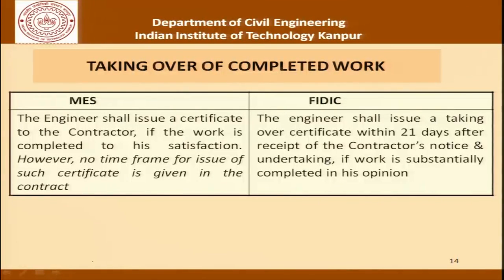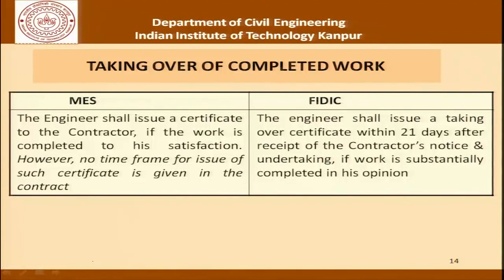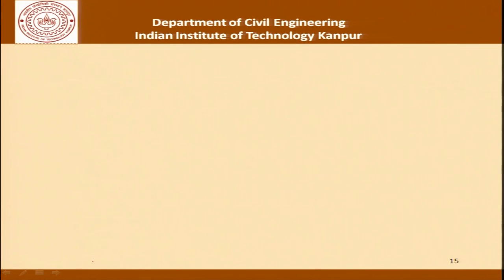Regarding taking over of completed works: MES says the engineer shall issue a certificate to the contractor if work is completed to his satisfaction, but there is no time frame for this. FIDIC states the engineer shall issue a taking-over certificate within 21 days after receipt of the contractor's notice and undertaking, if the work is substantially completed in his opinion. I leave it to you as a home assignment to study what is meant by 'substantial completion' versus 'provisional completion.' With this we complete our comparison of MES and FIDIC clauses. We will now move to the next discussion on PPP models.